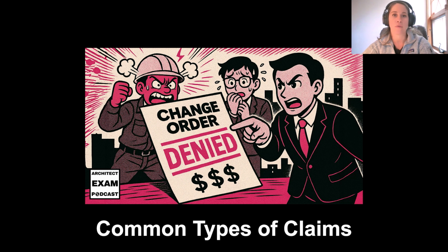So of course, you're processing the claim and the issue itself, but what is a result of having to process the claim? There's probably a huge delay on your project. So that can lead to extended overhead costs over your original project budget. The overhead costs can increase by 5 to 15%. And then you may need to accelerate the rest of your project in order to finish. So acceleration expenses to recover the lost schedule time can also increase your project budget costs.